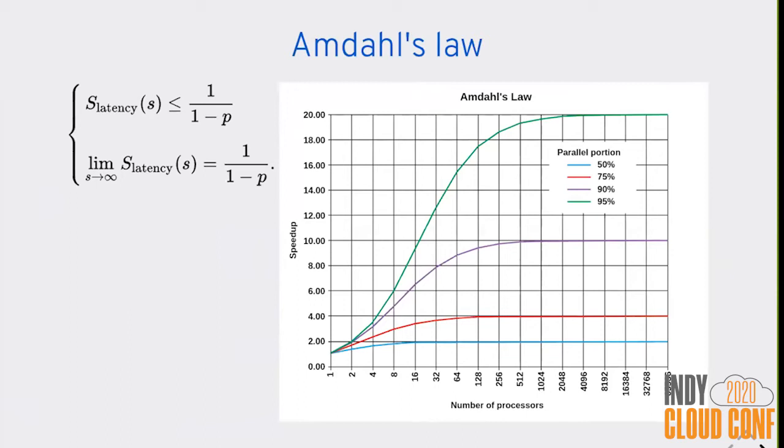And again, ignore the math, just know that there is math to it. You can see here, this red line, even if the project is 75% parallelizable, adding more than 64 processors, workers, units, whatever, is really not going to get you any benefit. If a project is 95% parallelizable, that's almost entirely parallelizable, then you can't throw more than about 1,000 CPUs at it, or it just doesn't give you any benefit. These numbers are a lot lower when you're talking about people. This is for CPUs.